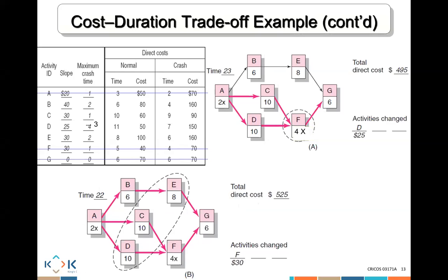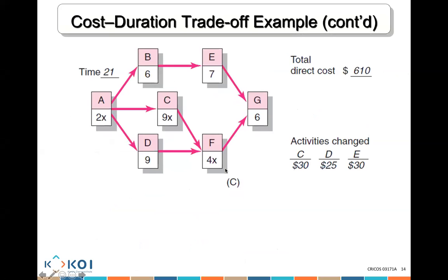So we always crush the combined tasks over any of the other tasks. No, you don't. You look always at the cost. In this example, the cost of the combined task was the cheapest. In other examples, the combined task might not be the cheapest. So you look at the cost all the time. Make sense? Yep. Any other questions, my friends?